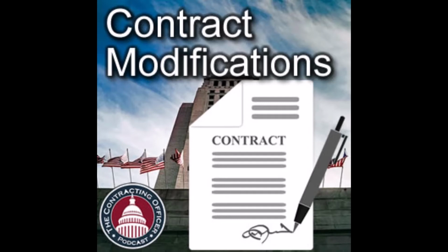Yes, this is an example of the economic decider having to be included in this conversation, right? Because the economic decider has some power here. Yeah, this is a great example of it being a team sport. I literally couldn't do anything until, in Air Force lingo, I got a Form 9, which was certified money. It's like, I have this money, I can't, and so for the funding folks listening, that's one of the things that could slow down mods.